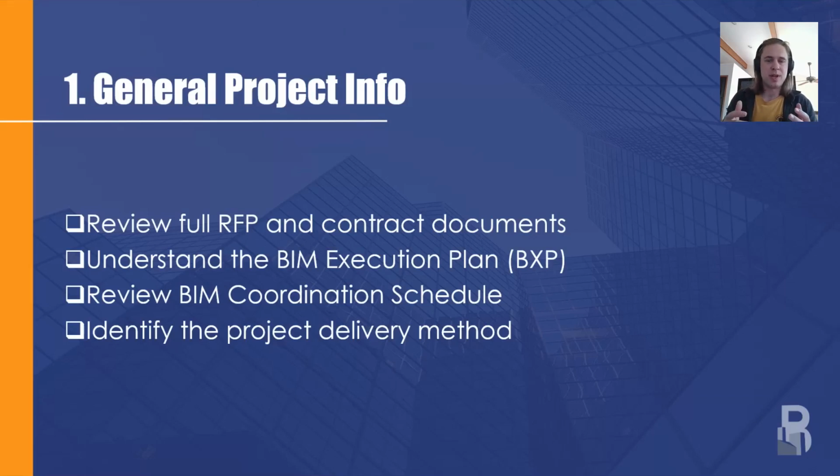With that BIM coordination schedule, reviewing that, if a coordination schedule isn't provided during the pre-construction phase, understanding what the timeline is for construction. So BIM coordination schedule supports the construction schedule, and so if the project is starting tomorrow, then we're already behind from a BIM perspective.